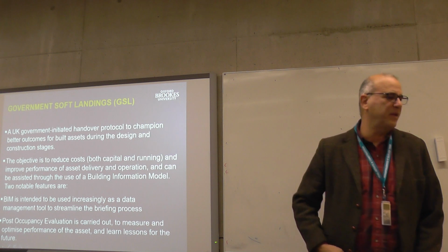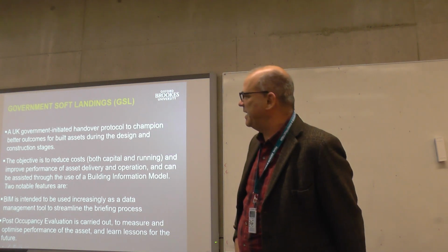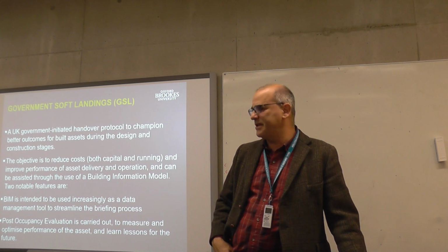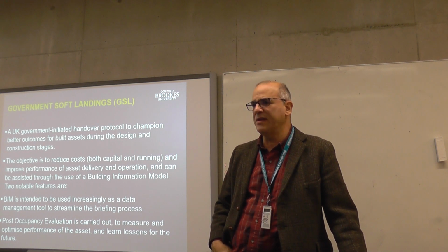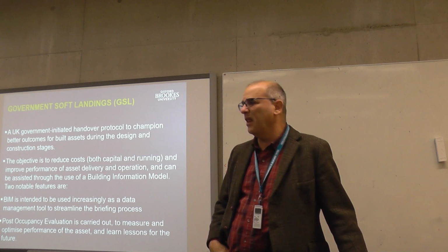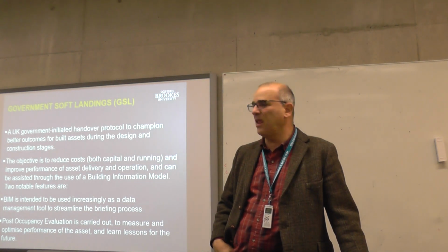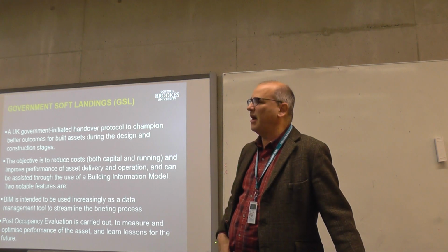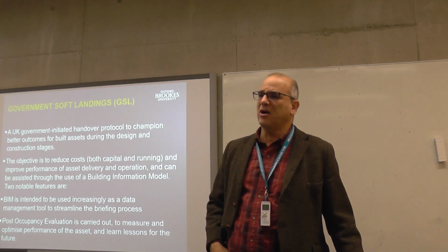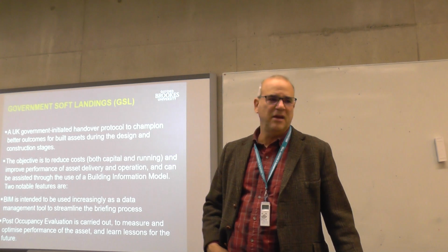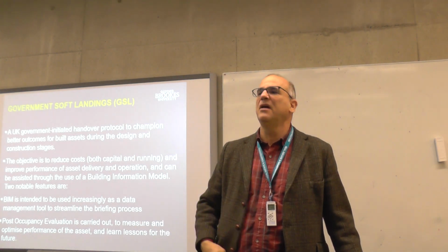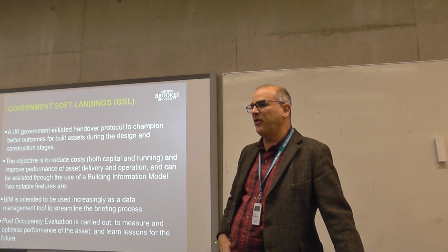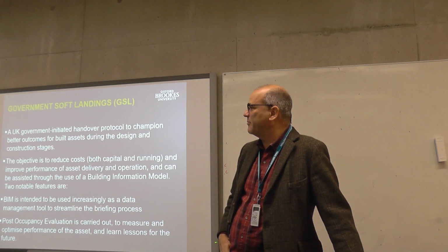I'll talk about the government soft landings because it has driven a new business area in construction, and has actually led to a lot of new work. And the idea behind the soft landings is that the contractor, rather than handing over the key and disappearing, sticks around and waits for the building to be commissioned, sometimes up to a year.